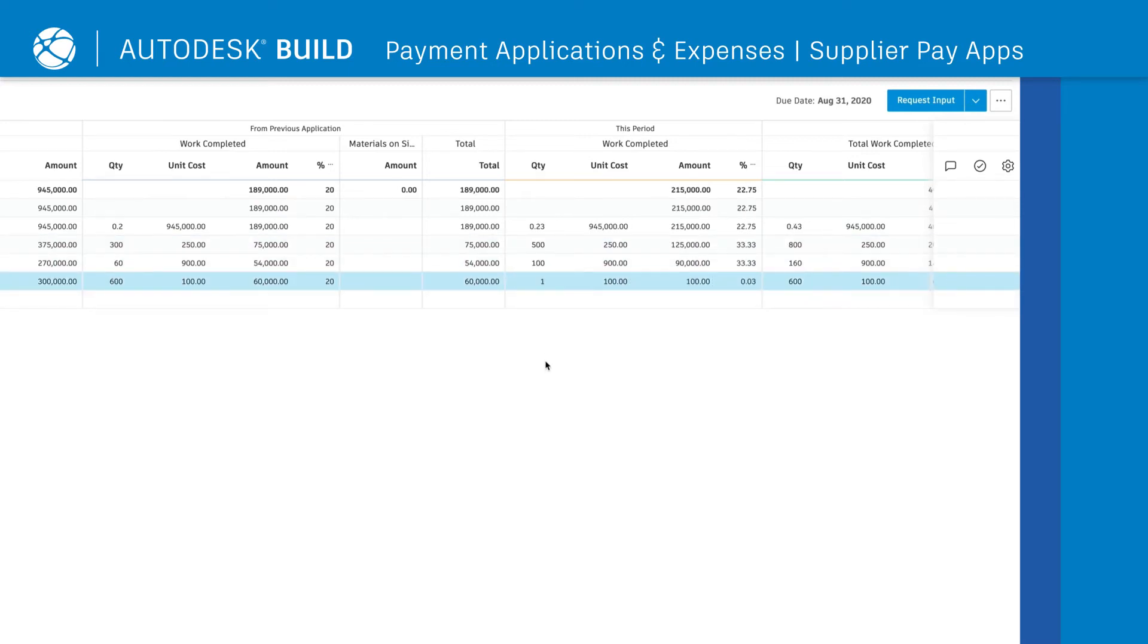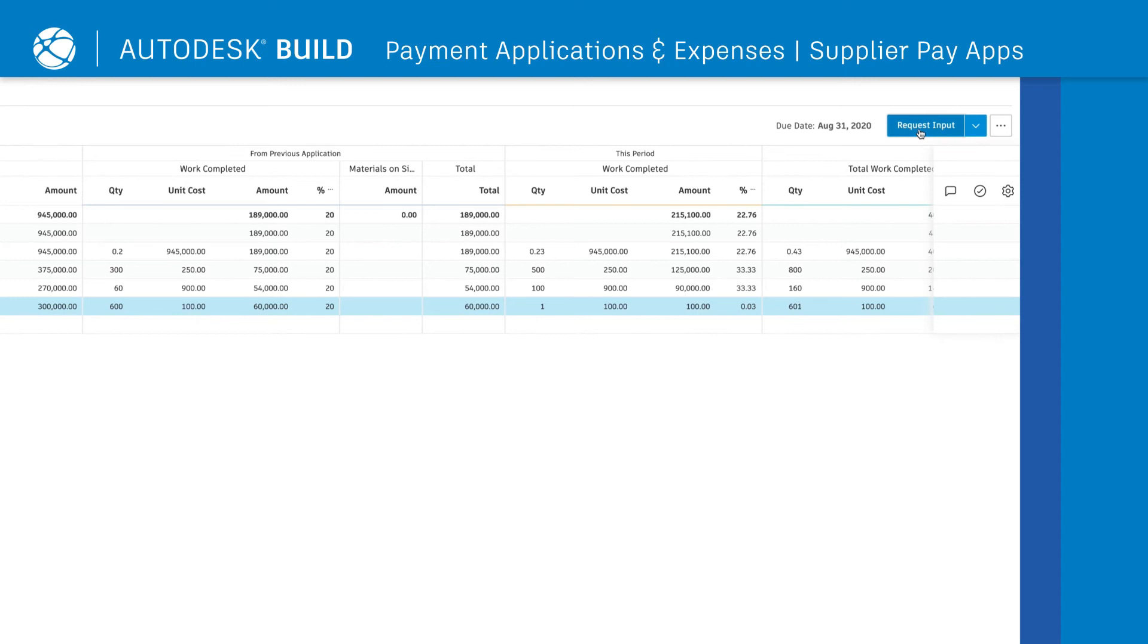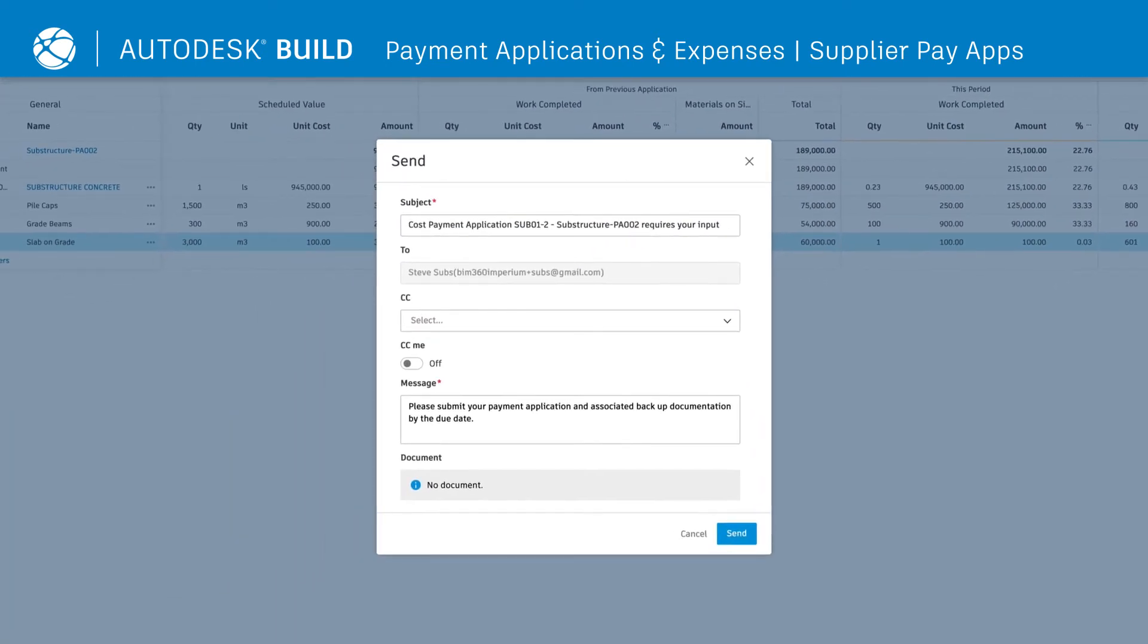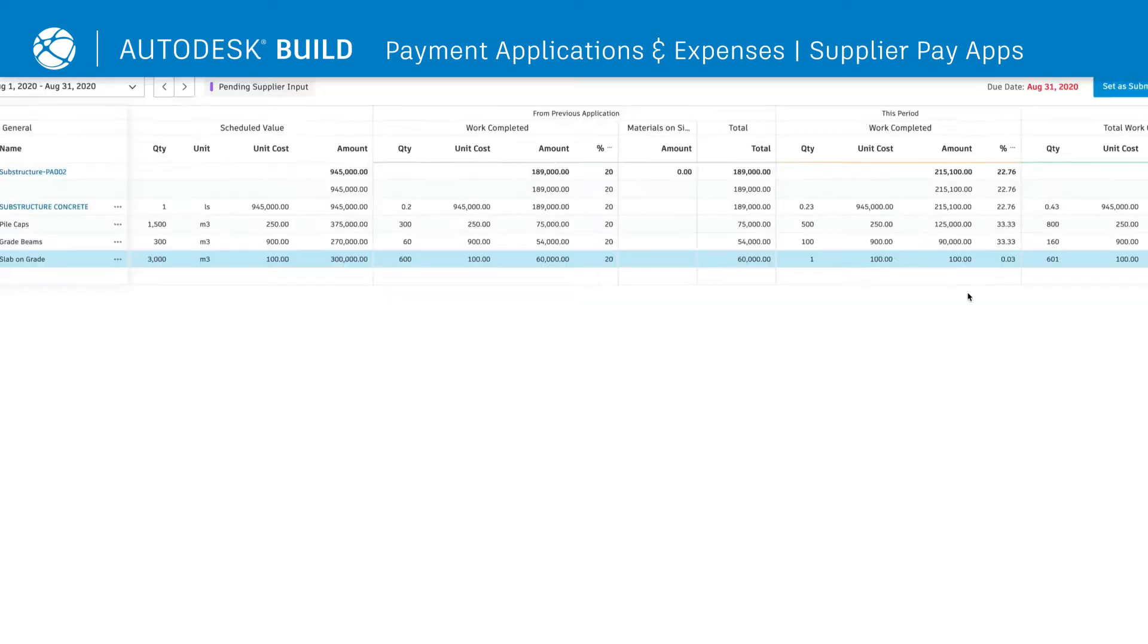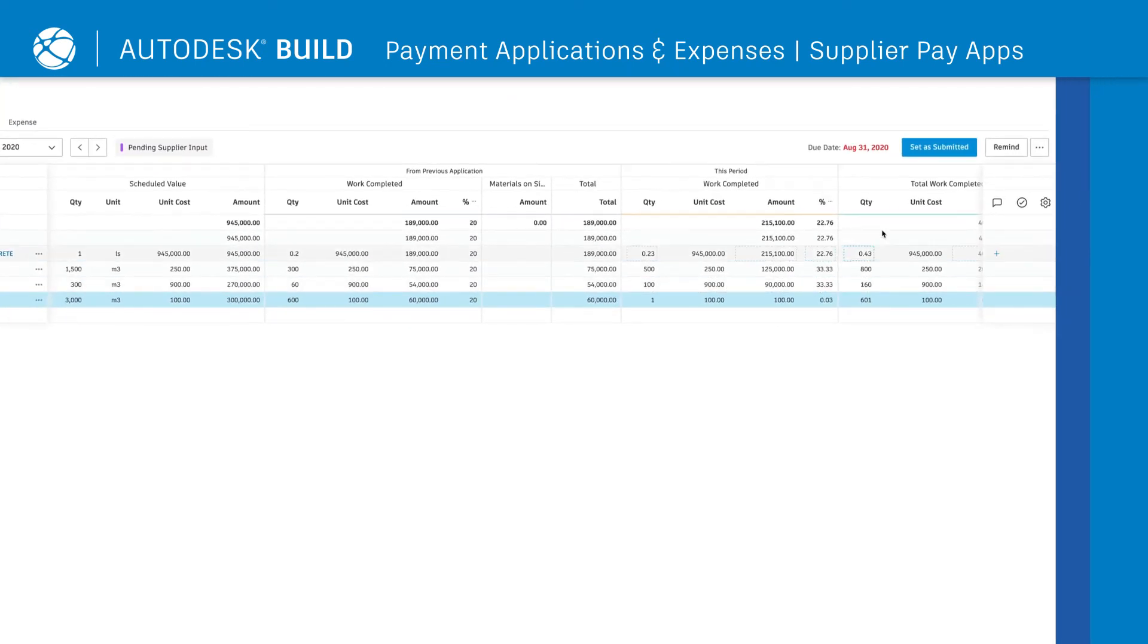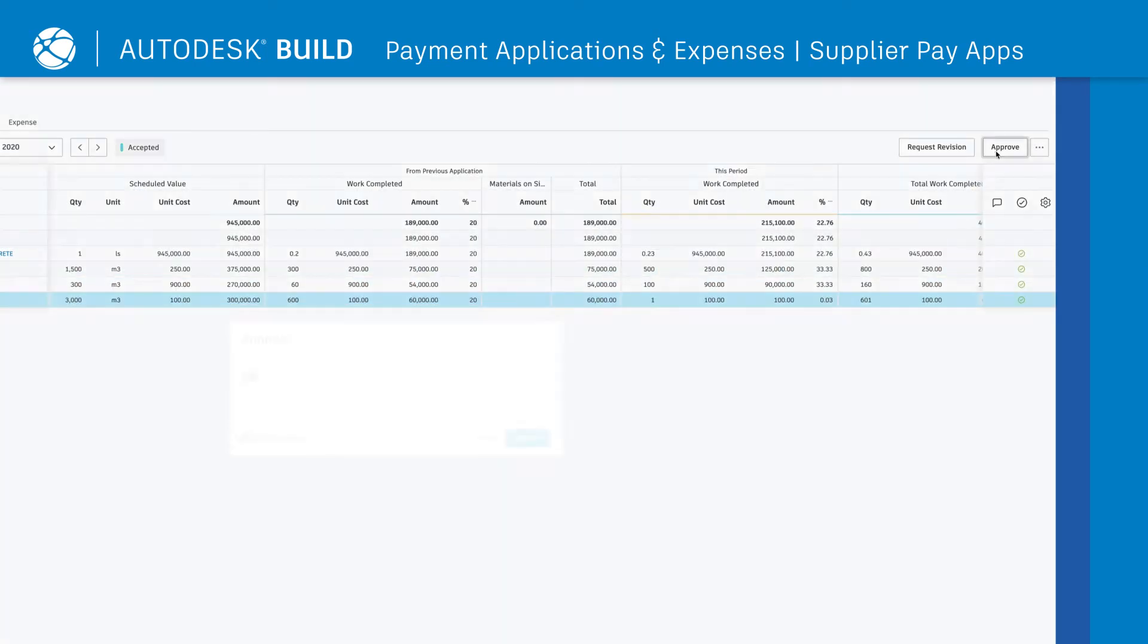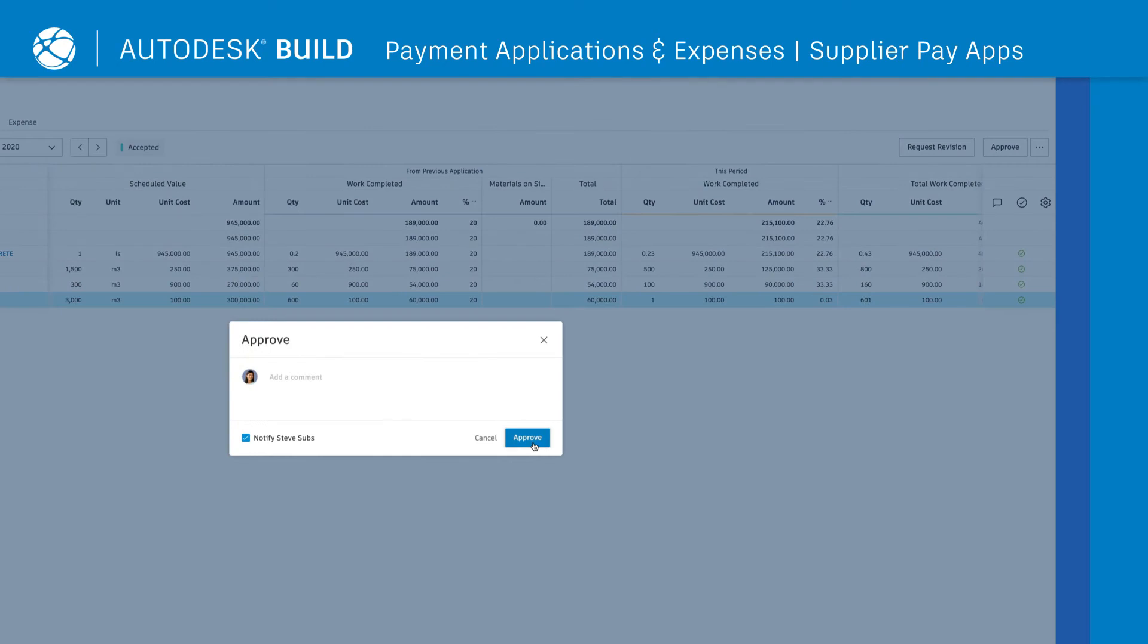Suppliers will be notified of the request for a payment application and can go into the system and update work complete. Once the supplier completes the payment application, construction teams can click Accept and Approve.